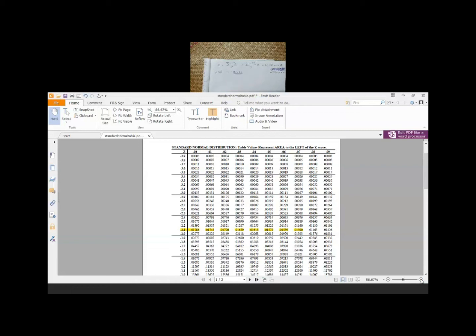Yes, sir. Okay. So if we complete the project 100 times under the same conditions, the project will be completed within 31 days only 1.5 times.